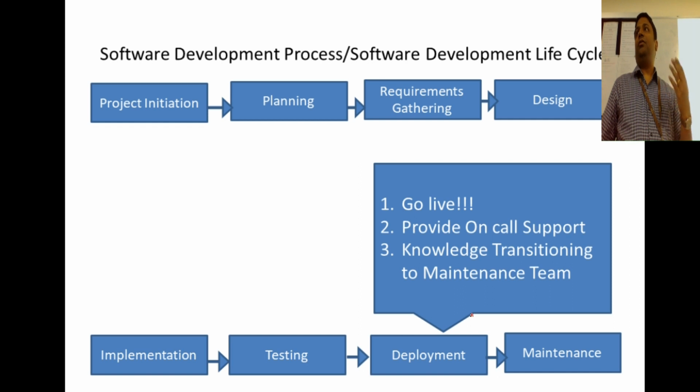As a developer, I have finished developing, testing, moving it to the production server. From now on, some other team will be maintaining it. So I'll have a maintenance team knowledge transition. I will say what this project is all about, what my code is all about, requirements, design, everything I will give. Transitioning will happen to another team. That team can be from your company or some third party company, maybe across the globe.